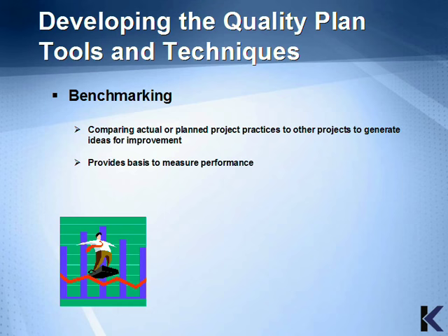The project manager for the current project decides to improve on this by 20%, which means a decrease of 40 defects on the deliverables for that phase. The project manager would then look at quality processes that would enable a higher quality product to be produced in earlier phases.